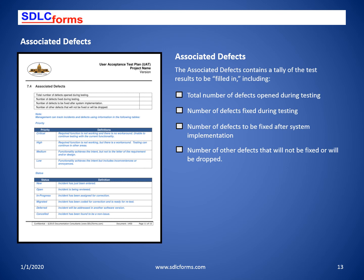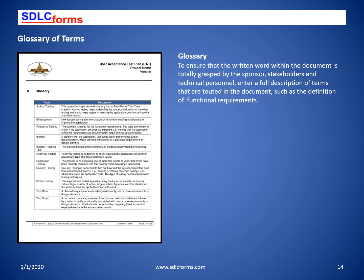Use the priority and status tables to identify the criticality of each defect. The priorities range from critical, to high, to medium, to low, in order that management can make a decision as to the path to follow to either correct the anomaly, use a workaround solution, or use the function recognizing that it satisfies the intent but contains inconveniences or annoyances. The glossary has already been started with critical terms in this fill-in template.